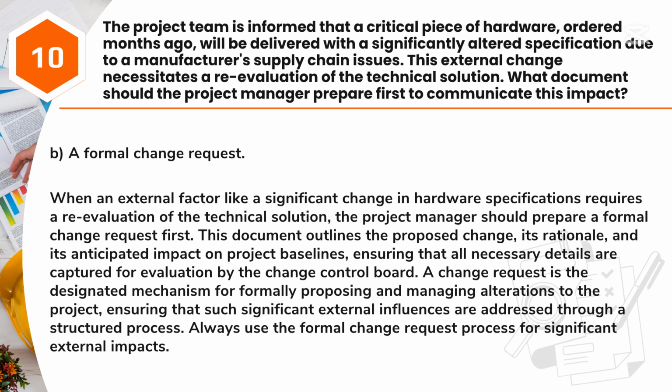When an external factor like a significant change in hardware specifications requires a re-evaluation of the technical solution, the project manager should prepare a formal change request first. This document outlines the proposed change, its rationale, and its anticipated impact on project baselines, ensuring that all necessary details are captured for evaluation by the Change Control Board.